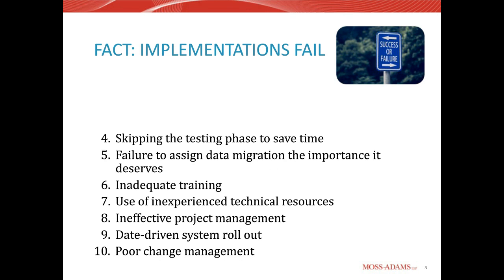Another reason is when you skip the testing phase to save time. When you go live on a project with little testing in order to save time and meet the project deadline, you can end up with a lot of issues, and then you start resolving problems in the middle of processing live transactions. And soon enough, you're overwhelmed and you're stuck in an endless loop of bug fixes. So don't cut corners on your user acceptance testing.